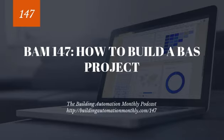Why do we want to get our materials ordered so fast? Why do you think that is so incredibly important? It all has to do with cash flow. So the trick with project management, and for those of you who are subcontractors, you're probably not going to like to hear this, but the reality is you want to try to work off of other people's money as much as possible,